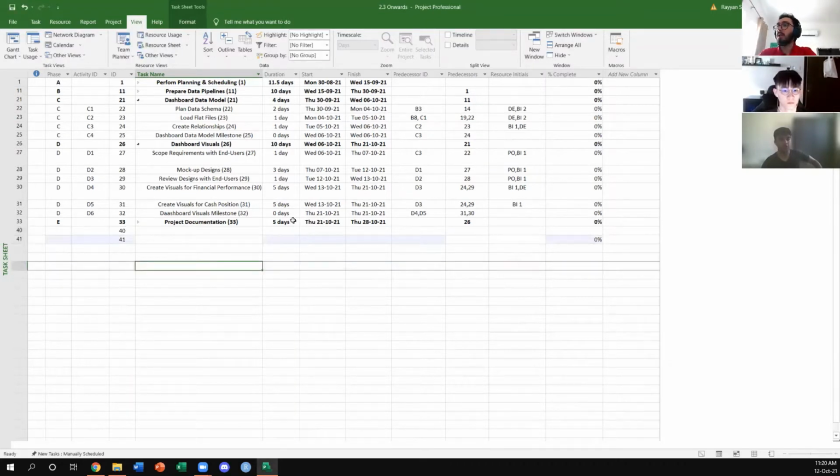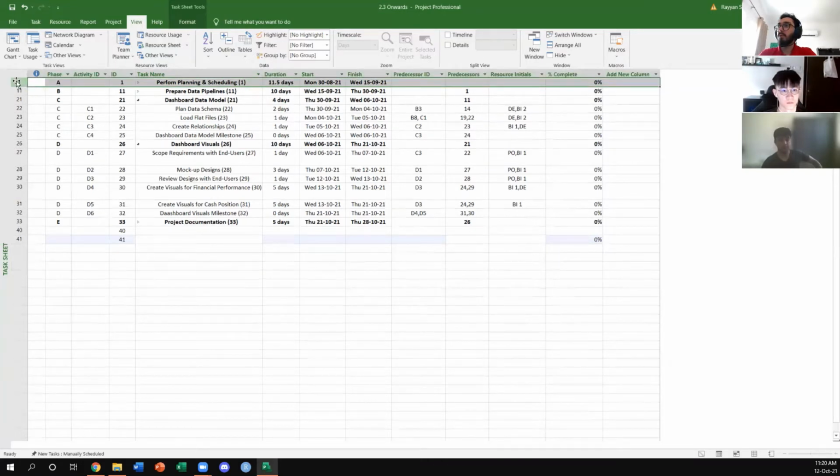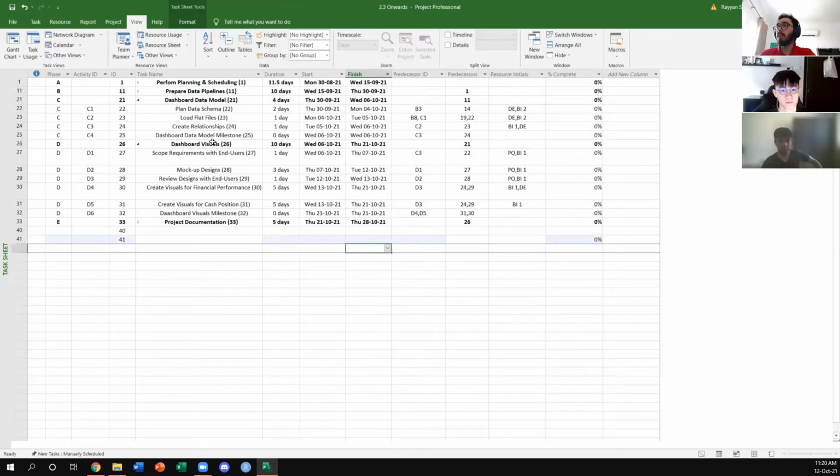All right. And so the duration, this is the overall duration for task A, for example, but we also have it broken down into the major phases. So each phase has their personal number of days required to complete the task. We have the start and finish dates, so we have an approximate idea of when they'll be finished. This works in accordance with the calendar that we have set up for the Selangor calendar.